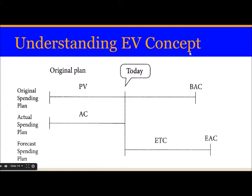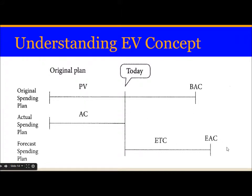This diagram illustrates the earned value concept. We are here today — the planned value is at one point, and the budget at completion is further along. The actual cost shows how much we have incurred to date. The estimate to complete shows how much more cost is required from today to finish the project, and the estimate at completion was set at the start of the project.